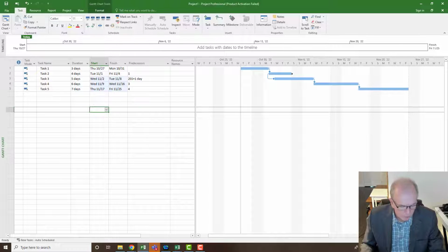But if we do that, we should make sure we connect this up with something that is logical. So the finish of this has to connect up with something else that's logical for us, because we don't like to have open ends, as I've said numerous times before in my other videos.